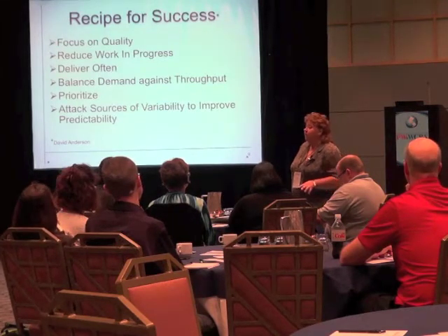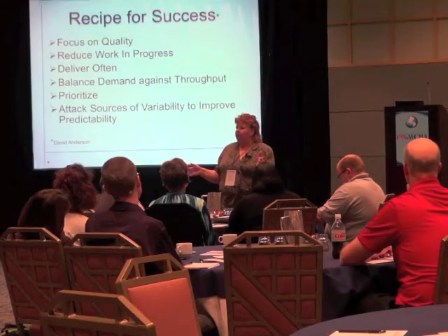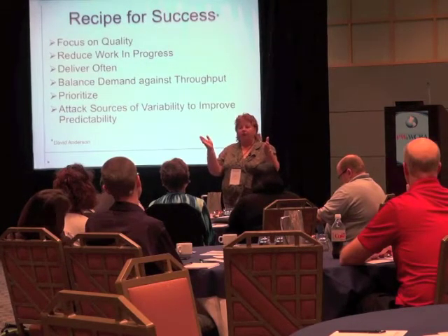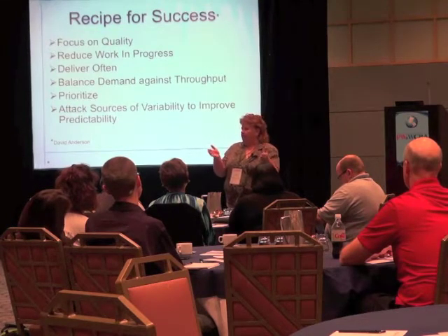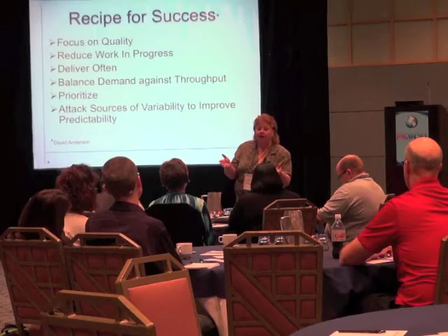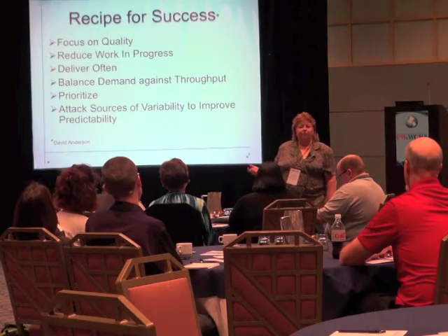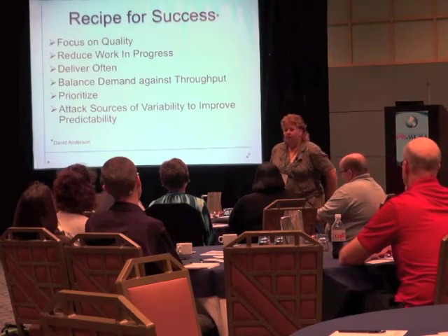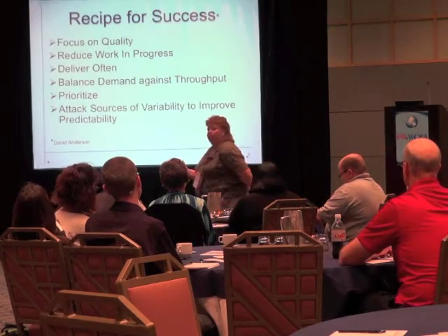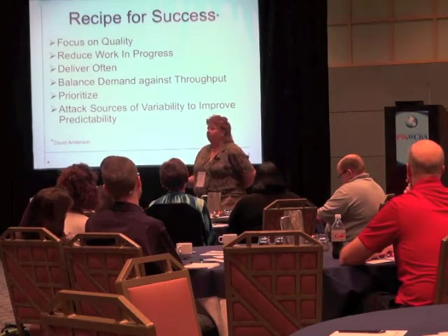What I am saying is, if you could get everything into a range, let's say everything fits into a range of 4 to 12 hours, and you can figure out how to make your tasks no bigger than 12 hours, you've clearly limited the variability in size, and that will help you with having a more accurate predictor of flow because things are similarly sized. Right? And depending on your work, you may or may not need to have that degree of accuracy.